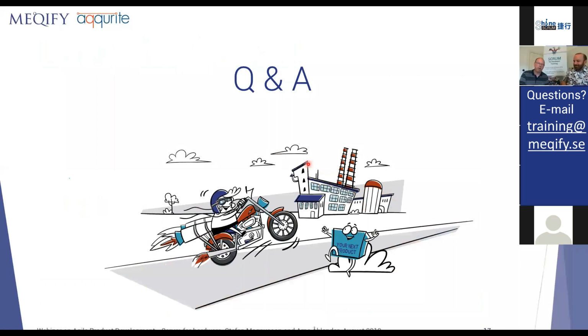We want to reflect reality, where if you work according to Scrum, in reality, it's the development team that decides how much to bring into the sprint. And one of the questions that we have received is how many people can be in one hardware Scrum team? And then there is a follow-up question if over 10 is okay. And we need to remember what the rules in Scrum say. Scrum says that a development team should be maximum 9 people. Stefan mentioned 11 before, but then counting Scrum Master and product owner as well.